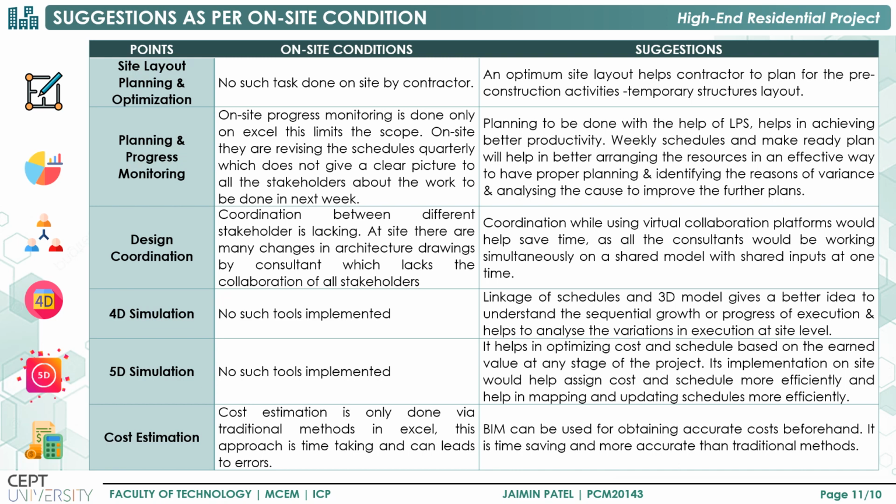And lastly, in clash detection and design coordination part, at site, there is lack of coordination between the design consultants and BIM coordinator, due to which clashes are identified later and design changes also take place. So the suggestion is they can use BIM 360 for the virtual collaboration among the design consultants and BIM coordinator, due to which they can identify the number of clashes at a time, and there will be fewer design changes and proper coordination will be there.